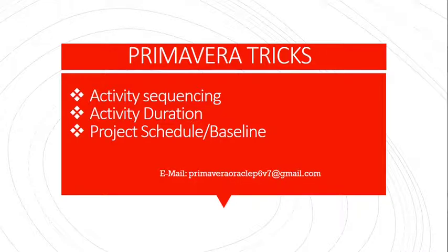After breaking down into the WBS, we will start our activity sequencing. What are the activities involved in one WBS? We will find out the activities, then sequence those activities, and find out the activity division through engineers and as per our past experience also. Then we have to make the schedule.